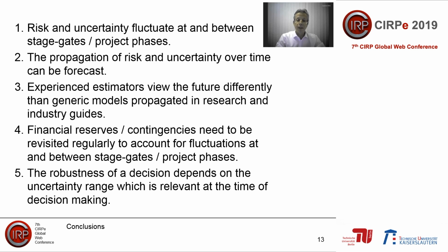4. Financial reserves or contingencies need to be revisited regularly to account for fluctuations at and between stage gates or project phases. And finally, 5. The robustness of a decision depends on the uncertainty range which is relevant at the time of decision making.